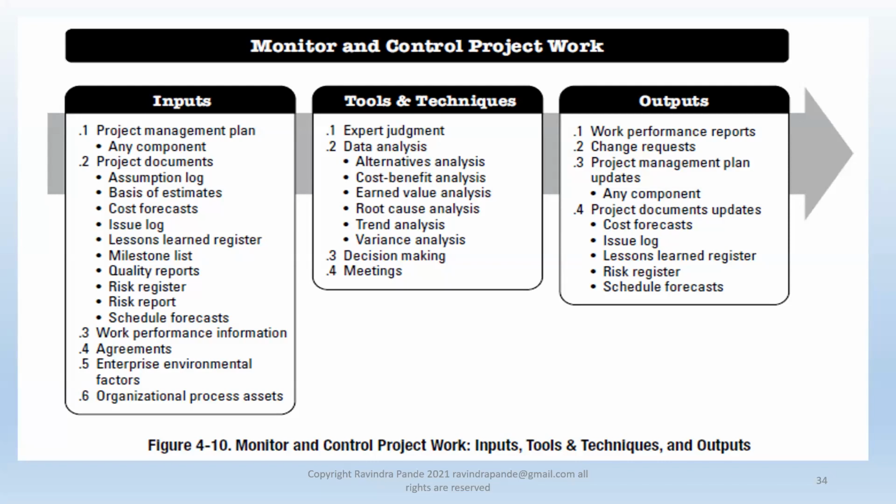Then we do have various data analysis processes included in project management, where we have something called alternative analysis. Whatever path you choose, let's say you're thinking of implementing an iris scanner in an attendance management system type of implementation. In a couple of places you might go ahead with the biometric instrument. Now these two have a very big difference in terms of their cost, in terms of their implementation ways and means. The biometric is at around $40 to $100. When it comes to iris scanners, it normally starts at $250 per instrument.